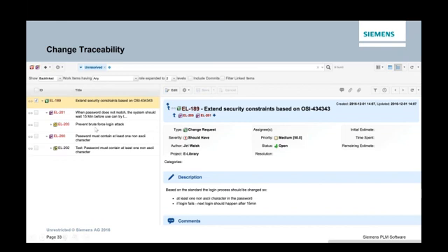So if I need to implement a functionality, I create a new work package or user story to implement it. Here I have the traceability that I need to implement a story to prevent brute force login attacks. So I will change this 15 minutes delay. Or I need to set up new test cases to match the new requirements. So with this approach, you can always measure the test coverage. You can measure the progress of your implementation, and that's one of the biggest reasons why we recommend these stateless objects and highly granular requirements.